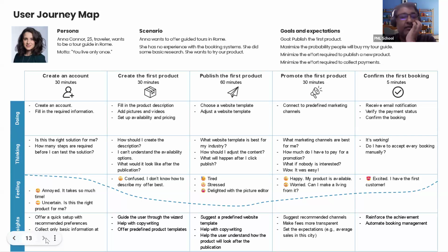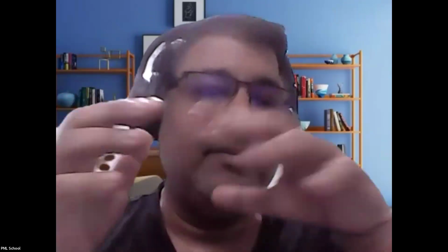Create your own template always. Use a standard one and then customize it. I think these are there, but I'll add roadmap templates. So coming back here, one is your theme based, what is your outcome based, and second is the timeline based, and then finally the workable one, which is feature based. These are three types of roadmap for three different stakeholders. Same content, a little bit different audience. So we'll try, and then this is how the product will be launched.